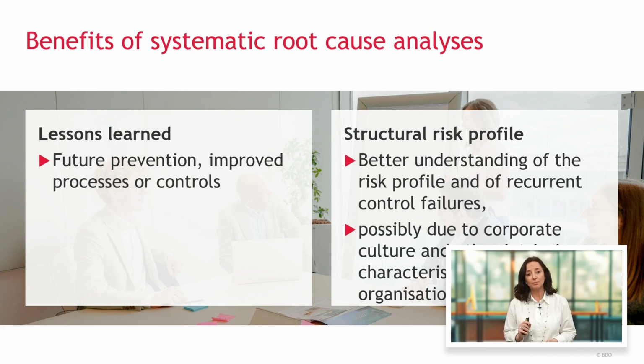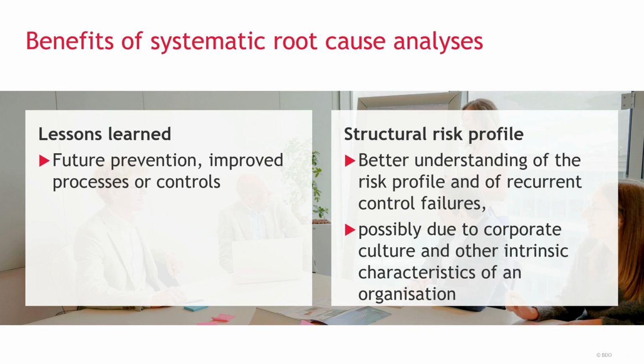But there's another benefit, much more powerful, of a bow tie analysis, is the multiplicity of the bow tie that you can operate in a firm. My strong advice to you is that every time you have a large incident, not only you do a bow tie analysis for that particular incident, but after that you compare the different analysis to look for the recurrent causes, the so-called patterns of failures.